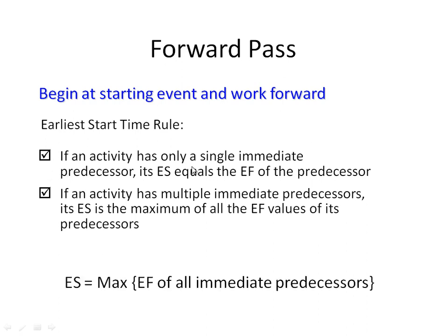If any activity has only a single immediate predecessor, its earliest start equals the earliest finish of the predecessor. So if I finish task number 1 on Friday, then I can start task number 2 on Friday. If I can finish on Monday, then I will start on Monday.